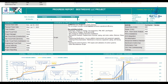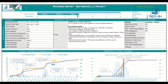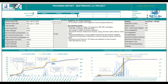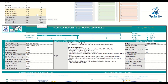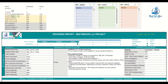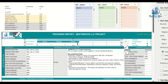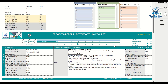You can come to the top-left corner, put your company logo, and then add the name of your project. Next comes the length of your project. I've set this up for a six-month project, but you can always come down and modify it to 12 months, 24 months, or whatever you need. To do that, you go to the top, change the value to 12 months, then right-click, click on 'Format Axis,' and convert 6 to 12.